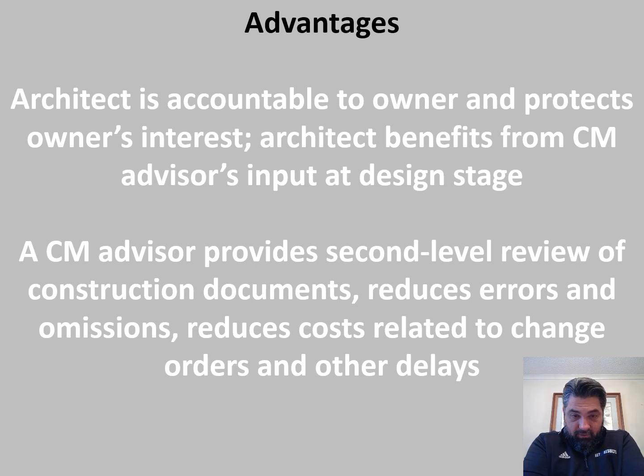A construction manager as advisor provides second-level review of construction documents. It's not to say that the architect shouldn't do their own quality control on their documents, but an extra set of eyes doesn't hurt, and so that can reduce errors and omissions, and consequently costs due to change orders, time due to change orders, those sorts of things.